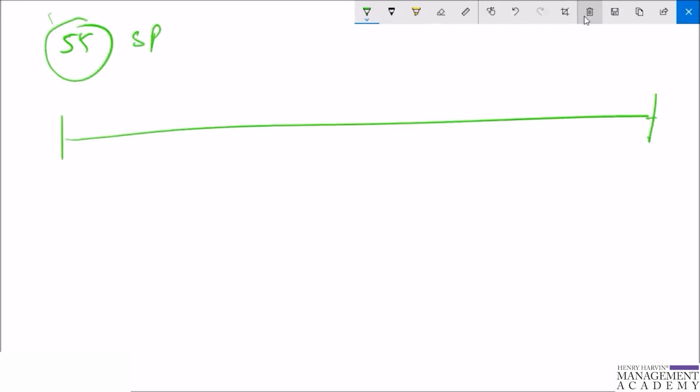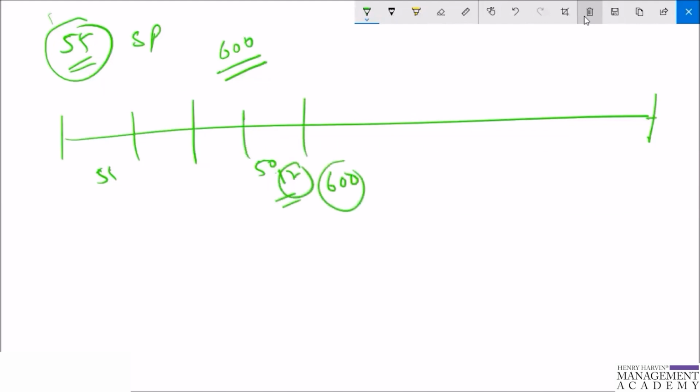So if they have estimated the entire project at 600 story points, which means that if they are delivering 55 story points in one sprint, they are going to deliver, say suppose, 12, which means they need 12 sprints to complete the entire project.